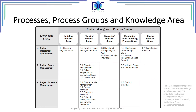In this table we have the knowledge areas in the vertical first column, starting from chapter four of the PMBOK, and in the horizontal row we have the different process groups. For example, for project integration management, in initiation we develop the charter; in planning we have all those different elements; in execution we have direct and manage the project work and manage knowledge; and in monitoring and control we perform integrated change control; and finally closing.